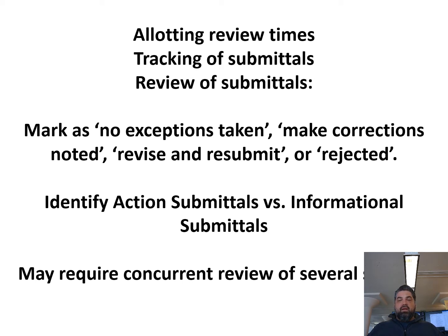You could mark it as make corrections noted, which you may mark notations on there, so fix this, fix this, fix this, or provide this additional information, and then you send it back. And what that means is that, hey, you're okay to go with this. I don't have any exceptions except for the corrections that I've noted on there.